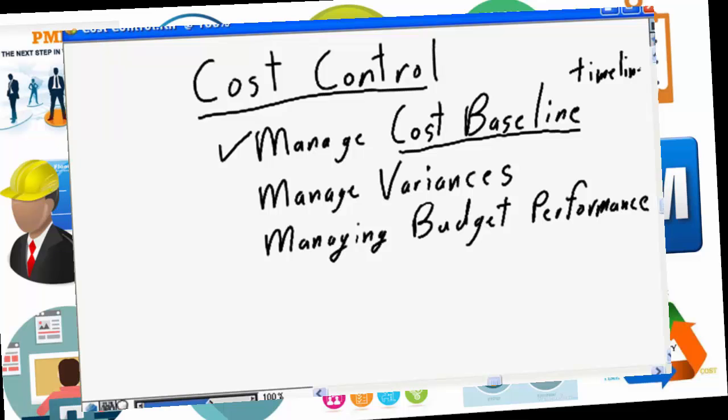As we discussed in the previous nugget, you can be in as much trouble as a project manager, and I've been there, let me tell you, as much trouble as a project manager delivering the project on budget but not meeting the cash flow analysis, surprising the accounting department with a bill for $20 or $30 or $50,000 in a month where the cash reserves and the cash management plan wasn't in place, simply because you accelerated the project, simply because you brought in an expense to your project a month or 2 or 3 months earlier than the original cash flow plan.